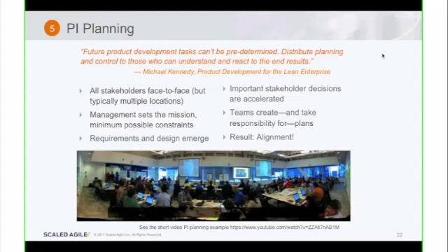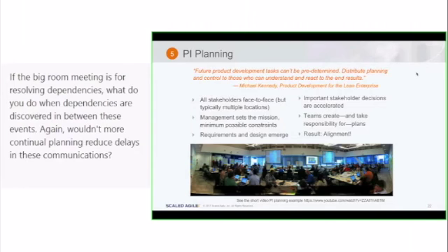That's why large scale planning, if you don't do it this way, can literally take months because everyone's uncertain, right? And they keep having meetings to discover what all the dependencies are. And so if you have everybody in the same room, it takes 2 days of effort, but at the end of it, you come up with a plan that everybody's comfortable with. That's great. Thanks, Armin.